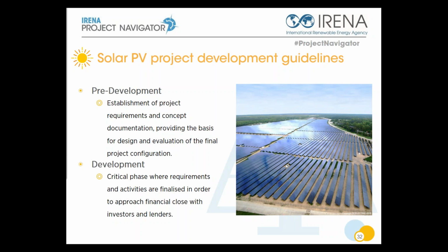And we do it for the EPC contract, for the O&M contract, looking at preventive and corrective maintenance protocols. And all those need to be inputted into a financial model. So we provide, in a first step, recommendations on modeling, so understanding what are the different parameters investors and banks look at. Investors will look at IRR and banks will look at DSCR. How much are you covered in terms of those ratios? We provide examples of how you can conduct stress scenarios on these parameters, and how you optimize your return.